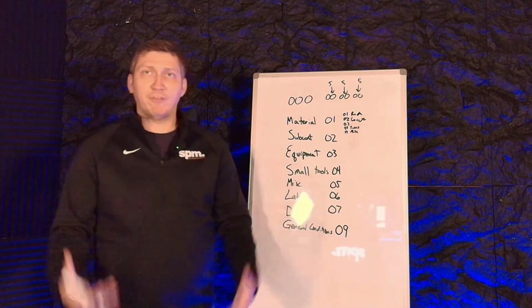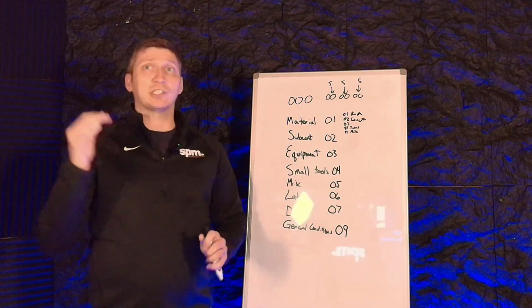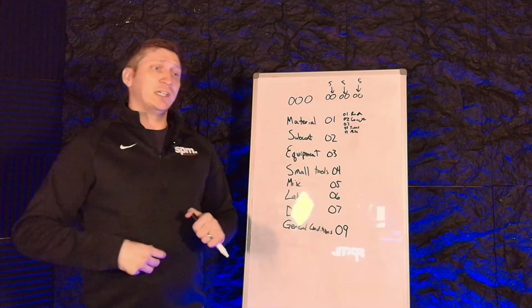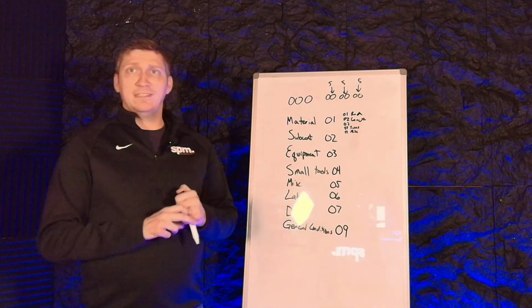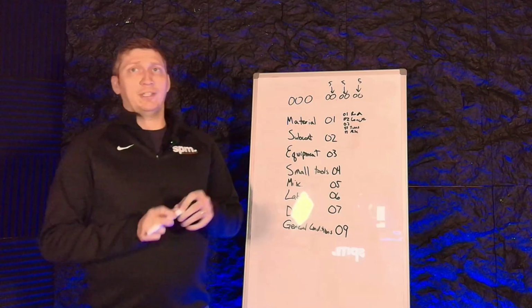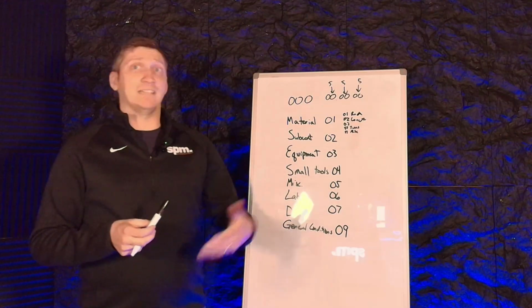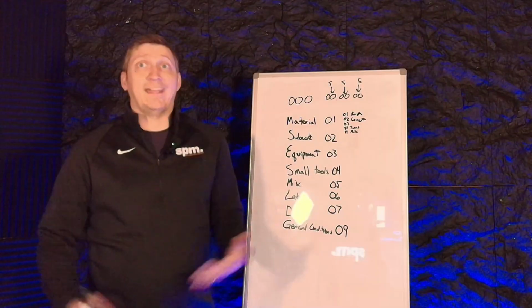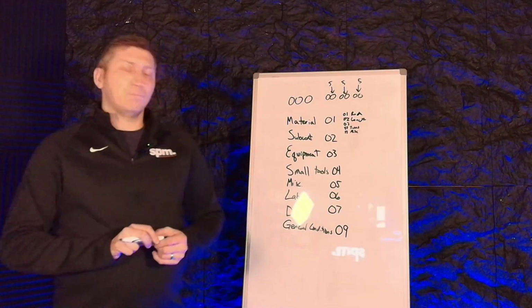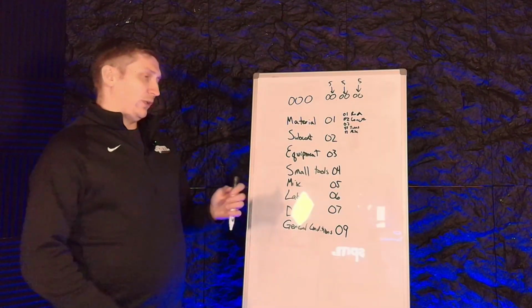Then I have a slot for foreman, depending on how big your company structure is. You want to have a project manager, assistant project manager, BIM, office admin. If there's somebody that's dedicated on site, or maybe they do certified payroll and you want to see, did I estimate enough for certified payroll? Because it takes them 40 hours, but I thought it might only take 10. Those are good things to know. Legal will go into that as a bucket.